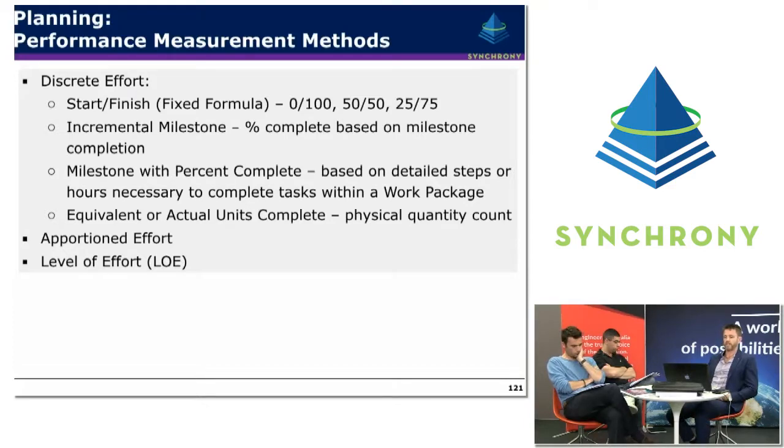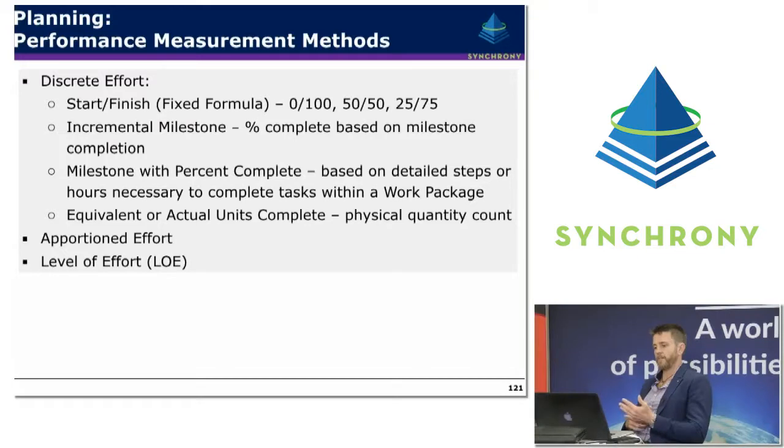Milestone with percent complete is based on detailed steps or hours necessary to complete a task within a work package. So this can be fairly similar to the incremental milestone, except that as you're progressing towards those milestones, you're also able to claim progress as well, based on the expected resourcing or effort in getting between those milestones.